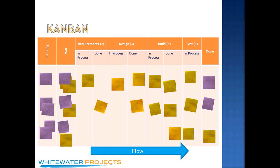You pull an MMF — a minimally marketable feature — into the starting column and break it down into the stories that make it up. Minimally marketable features are probably bigger than your typical Scrum story, though they don't have to be. The reason you don't break it down into tasks is that the columns are what your tasks would be — requirements definition, design, build, testing, and then done. You flow the stories through in-progress to done, in-progress to done.